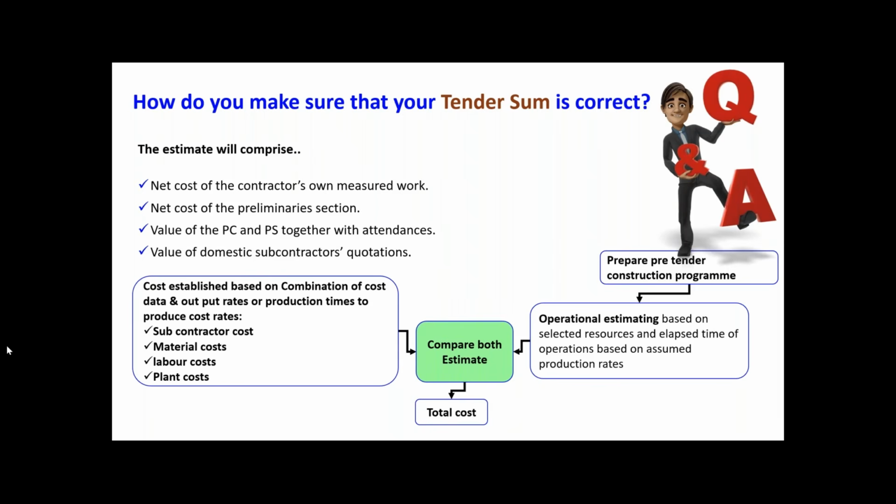Okay. In what aspect are these calculations different between the two? For example, okay, Prasanthi. Yeah. For example, say a concrete item. Maybe the operational team may price it higher because they always think about wastage and other factors and site issues. Whereas the quantity surveyor, we only rely on the design drawings, right?